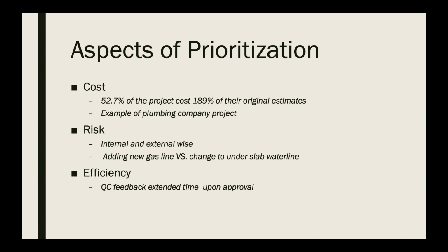The risk of adding new technologies into an existing project is analyzed from both internal and external aspects. The internal aspect could be the changes of existing code and software. So several questions to consider, such as: does the new requirement require rewriting the existing code? If so, will it erase what has been done or will it cause any crash of the system? If not, will the new code conflict with the old code causing insufficient content?